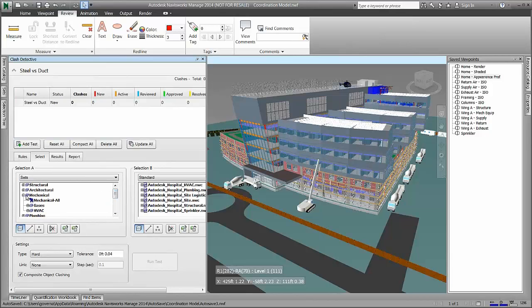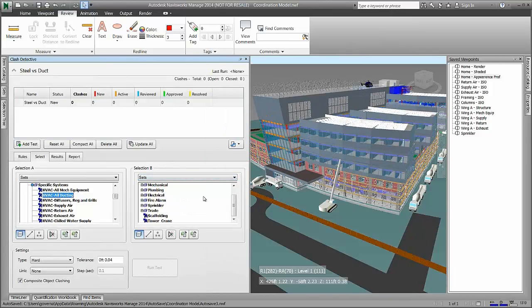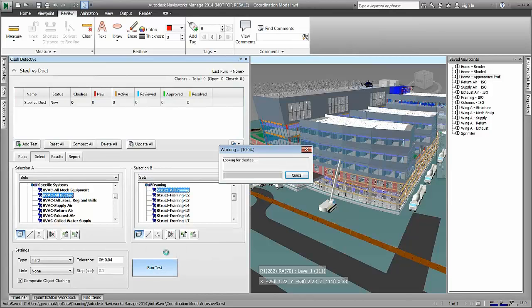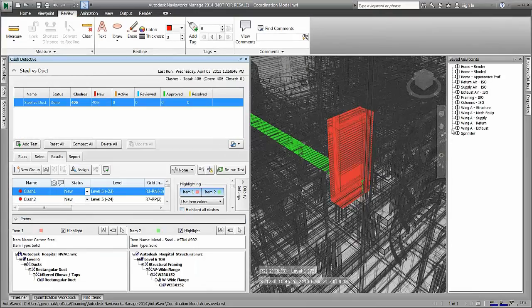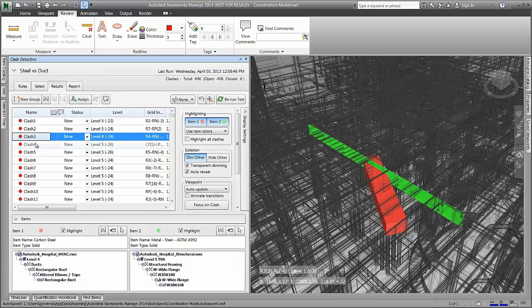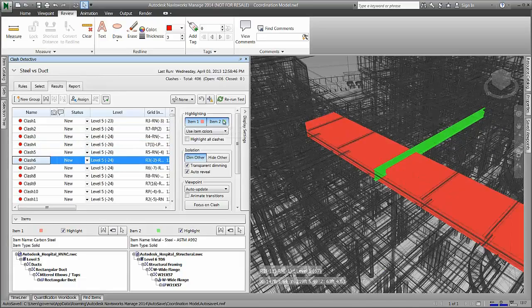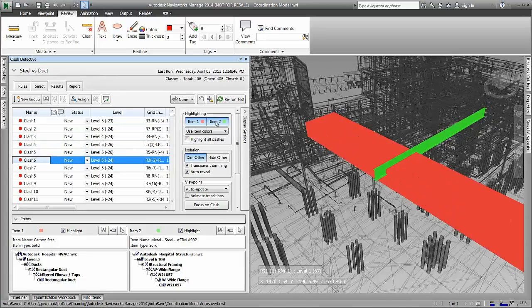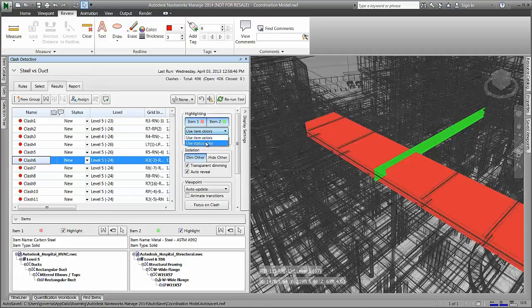The project model can then be analyzed for cross-discipline interferences, be they conflicts with HVAC systems and the steel structure, or adequate clearances around the fire protection sprinklers. Here we can see that a macro-level clashing of the systems and project components can be done. We can also follow our work breakdown structures and leverage the area and zone schemes established for executing the work. We see how issues can be visualized more clearly, reviewed in a collaborative way, and assigned for follow-up actions.